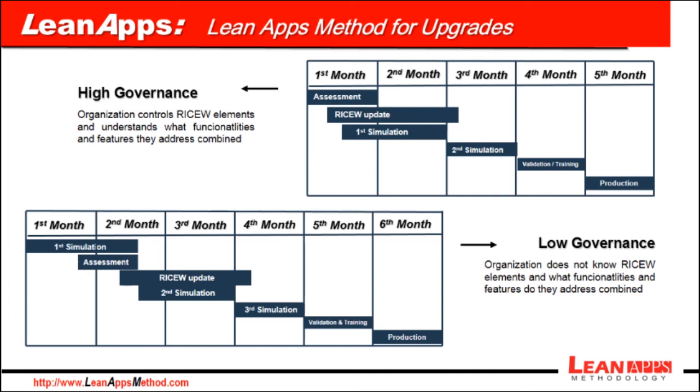If you cannot know in advance what custom objects add up to what customizations and extensions, you may not be able to perform assessment upfront and will need to start a project without much assessment. Only after first simulation you may be able to know what customizations stopped working.